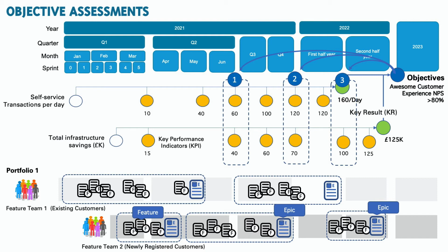Furthermore, and this is something that is typically overlooked, the scheduling of the appropriate number of objective assessments, which we are now indicating on the infographic. Here we have three customer surveys, the first scheduled for the end of June 2021, the second scheduled for the end of December 2021, and the final one is scheduled to coincide with the planned step-down of the first Agile team.